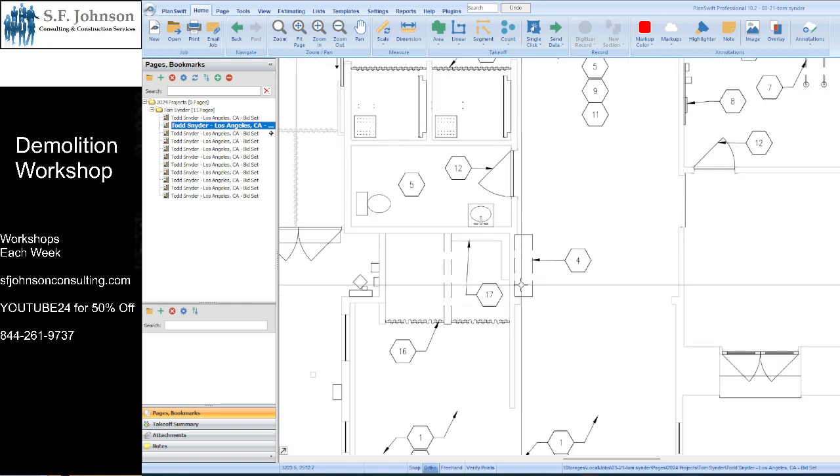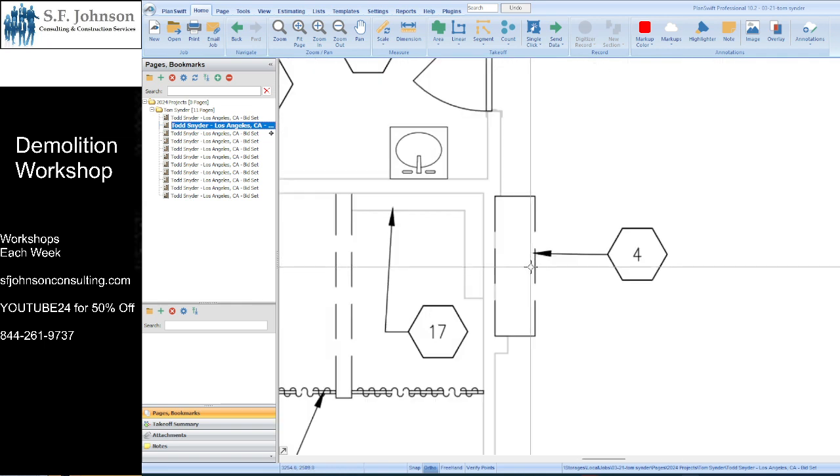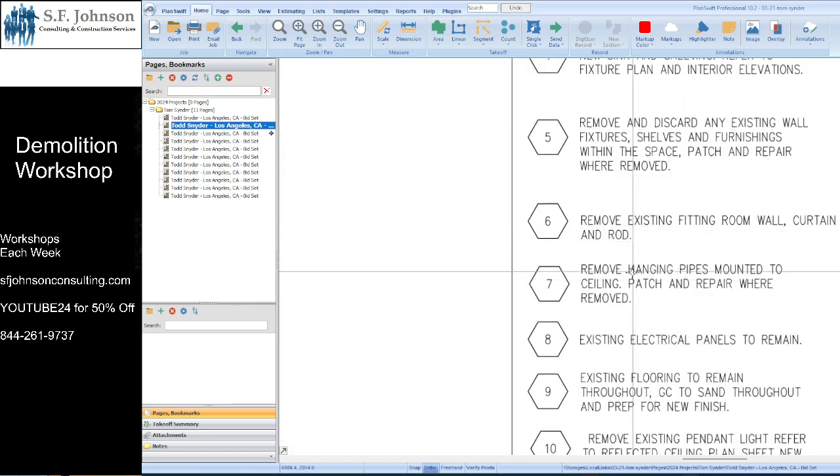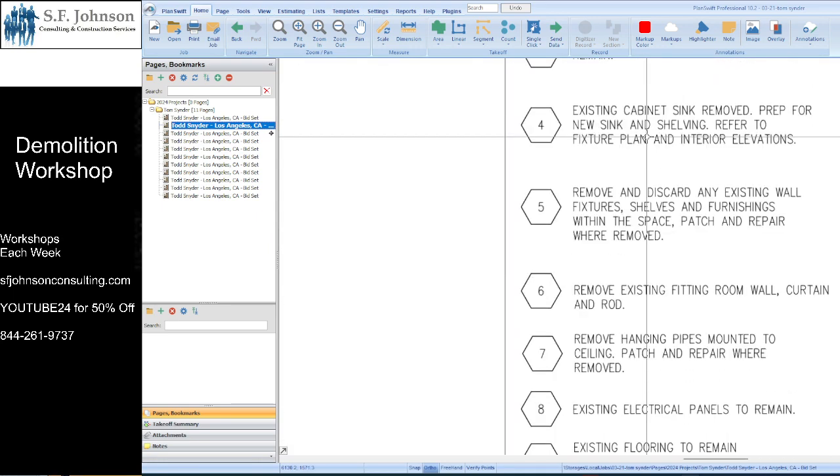And anytime you remove a plumbing fixture, you got to make sure you cap the line. So when they replace it, they uncap it and they do the work. Okay, that's 4. So not very detailed. So I would give something like that an hour of demo time, just in general, because we don't know what it is until we win the contract and we do a walkthrough. So for all of the new people that bid.